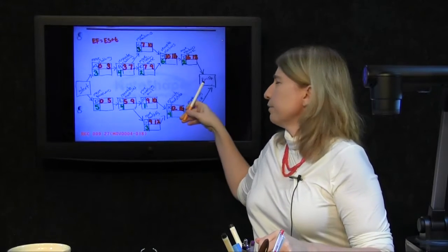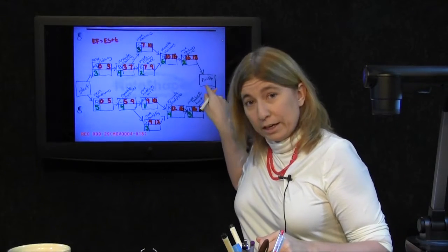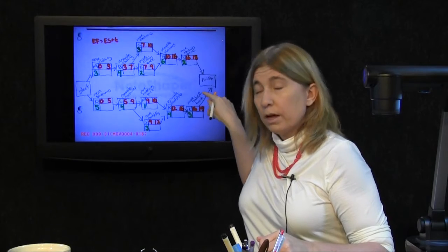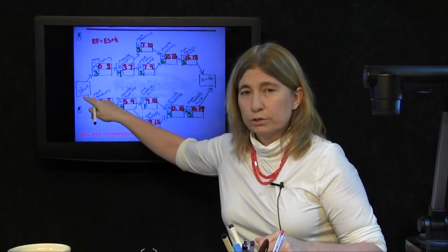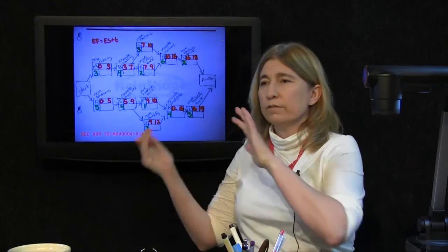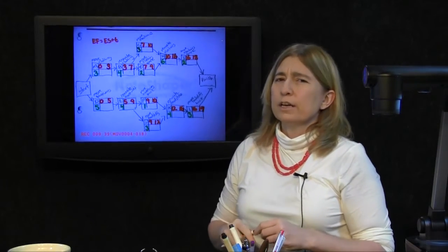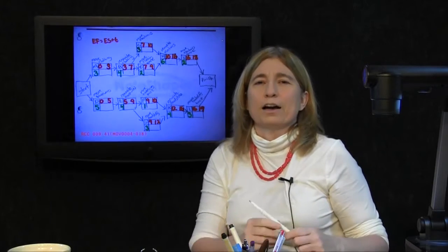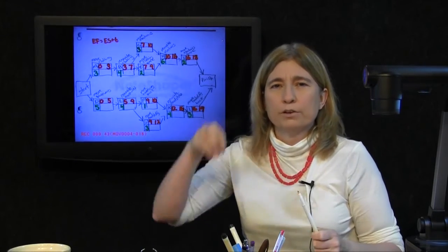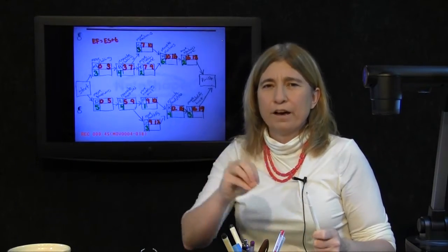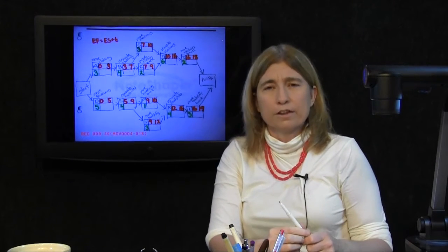You find late start, late finish times by beginning at the finishing node, working your way back towards the starting node. It's kind of the opposite or the reflection of what we just did. Now, you begin at the finish node with that fact that we just obtained for the question before, that fact that they could get done in 19 days. We make that their deadline.